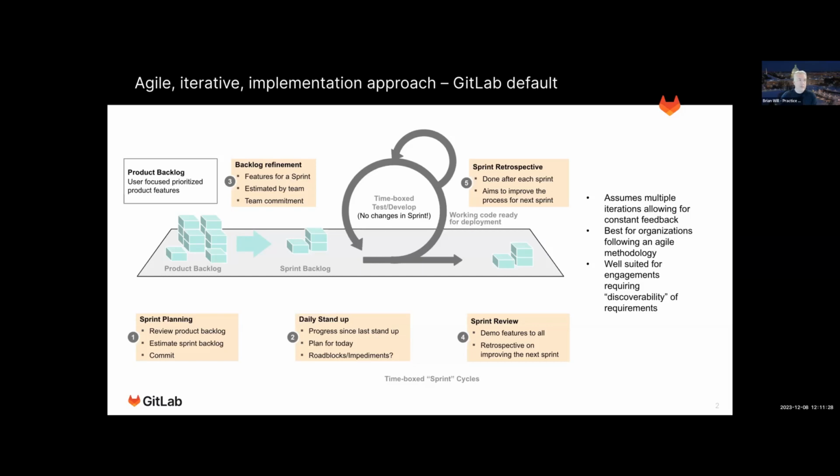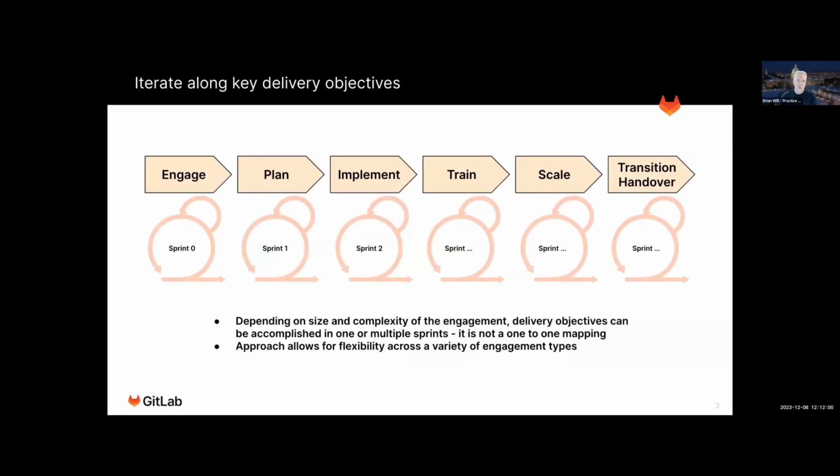I always tell folks that iterating fast is great, but if your customer can't iterate with you, then sometimes you're basically out of sync. So I had that experience when we're basically delivering systems pretty quickly, and some of our customers were like, whoa, whoa, whoa. You just integrated that into our data center. We don't want another version. So you have to just understand that there's a wide variety in terms of cycle times, what's acceptable. But generally, somewhere between a week and 4 weeks is sort of what's done in the industry right now.